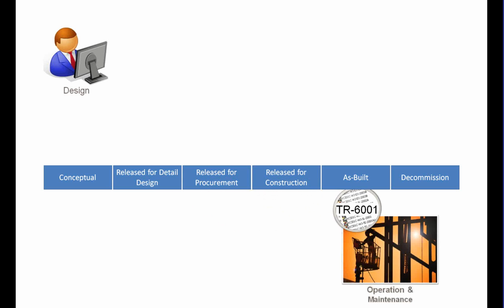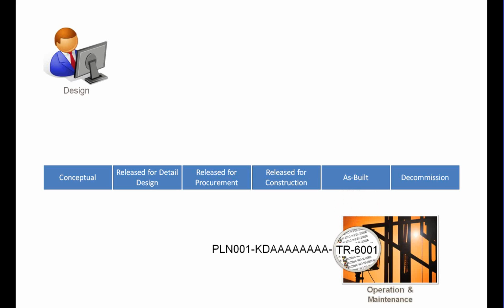The problem is that even internal to our environment, the language that we talk around the asset through the project execution process is not the same language that will be used around that asset in the operations and maintenance environment as it specifically relates to the tag, the functional location. We, in the project execution process, see the tag as strictly a functional location, where in operations and maintenance, they have to marry that tag to some sort of hierarchy that usually relates to a system of accounts.